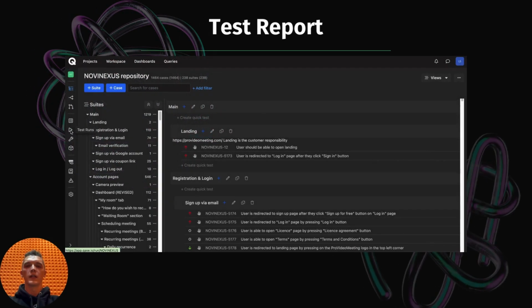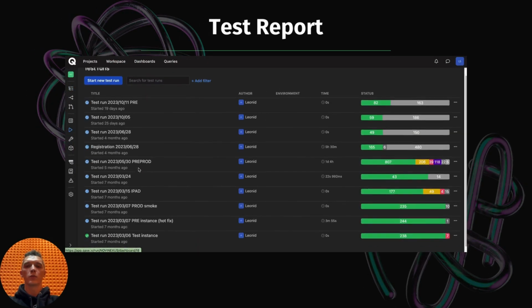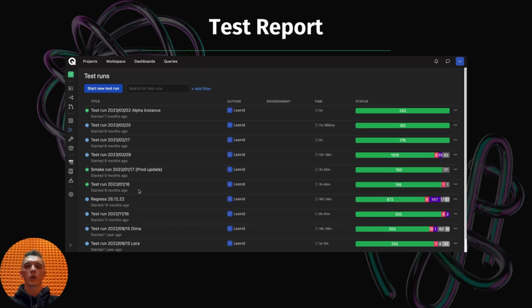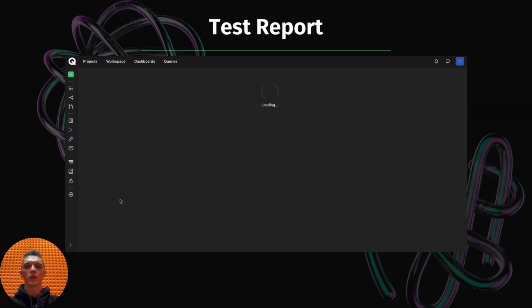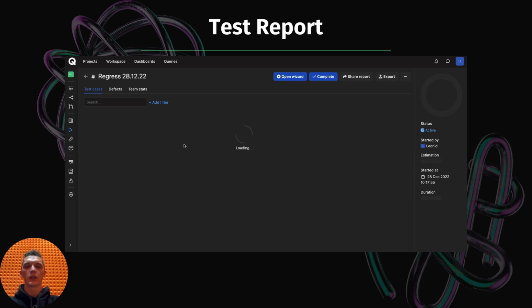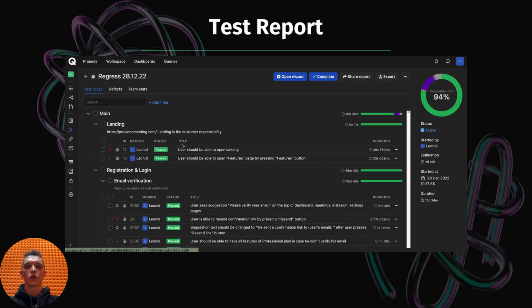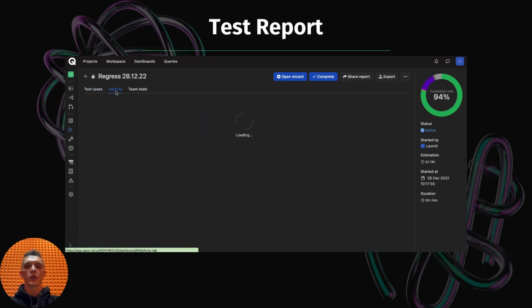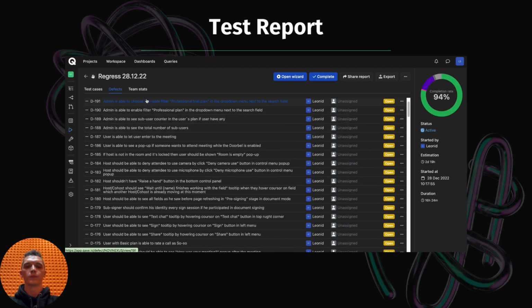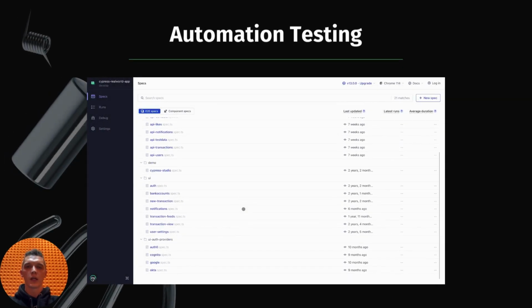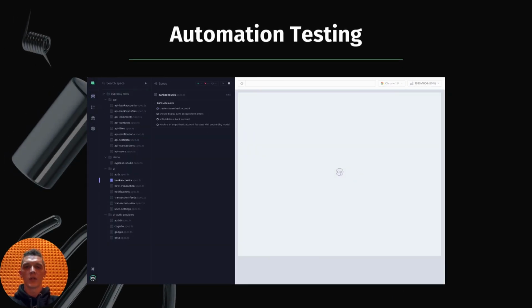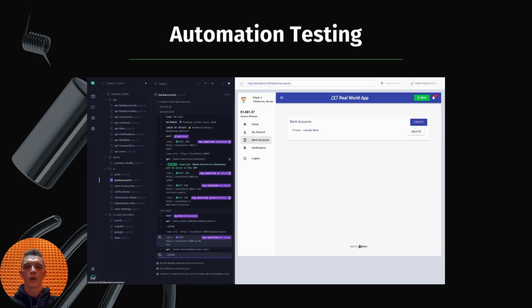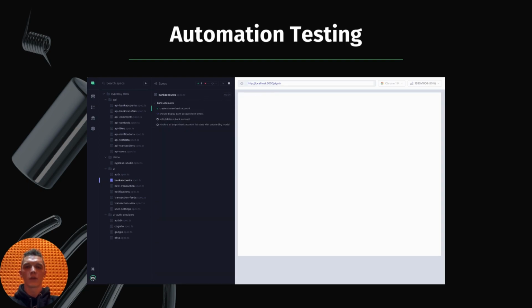At the end of a separate phase of work, we have a stable version of the product installed on a demo environment. The tester performs regression testing before demonstrating it to the customer. A detailed report of the test results is provided to the EPM project team. It provides information on which components have been checked and whether anything needs to be corrected before handing over to the customer. With each new version, the amount of checks required grows along with the number of features in the product itself. And having time to check everything by hand becomes frankly time-consuming.